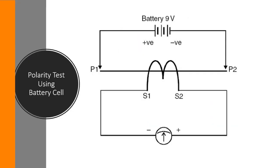Now, we will move on to the test. Let's talk about CT polarity testing. The polarity method is the battery method. You can see that a 9 volt battery is used. Positive connected to P1 and negative connected to P2, and on the secondary side you can connect a zero center galvanometer. You can give a pulse and the secondary side will move the needle in the direction of the polarity.